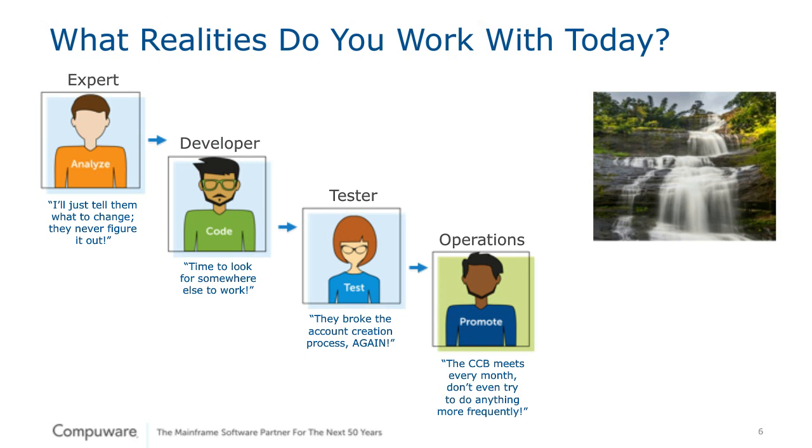For one thing, this process was very long. It might take as long as a year for this process to work through the system. So the ideas that you originate on the left-hand side might take a year to realize. And it can be really frustrating in that at each point, that delay causes frustration. And when mistakes occur, which they're going to occur, that's inevitable, the mistakes in this waterfall process have much higher impact because the process is so elongated that often the mistakes aren't revealed until the end.